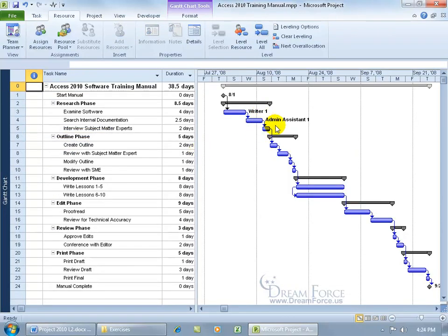Back in the Gantt chart, right click and go to the Gantt chart, you can see that they're assigned, but they're not connected back to the mothership. So they've broken off, and they're not tied to the resource pool because I didn't open it up, so it doesn't show me the additional resources. And those two that I've assigned, while it's not going to remove them, it's not going to be helpful for me to know if somebody else is using these resources at the same time if I don't have that connection to the resource pool when I open up my project.